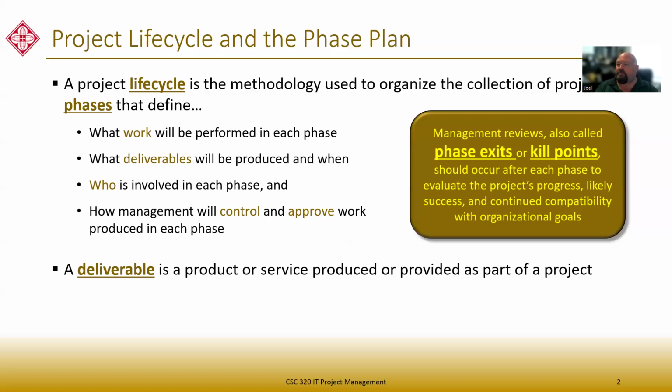So what happens if the phase isn't successful? So the timer goes off, ding, I'm in the cooking phase, right? So I go into the kitchen, turn off the timer, and I check the soup, and the soup's not done cooking yet. Well, then I failed my exit point or my kill point. So the kill point gets its term because at that point, I can decide to kill the whole project, right? If my phase was not successful, I could say, you know what, it's not worth doing. We're done. We're going to kill the project. That's where that comes from.